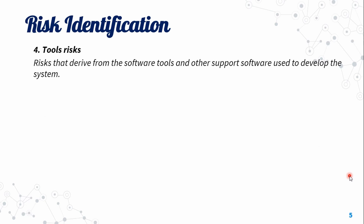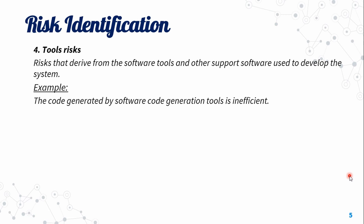Then there are tools risks — risks that derive from the software tools and other support software used to develop the system. For example, the code generated by software code generation tools is inefficient, or software tools cannot work together in an integrated way.